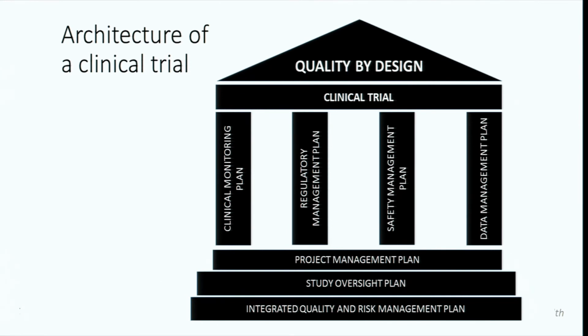You need to have a clinical monitoring plan, a regulatory management plan, a safety management plan. These are the sorts of things that are planned prior to patient one, and a data management plan. Now, if you're just the site, you're still doing those sorts of things, but from a site perspective. You want a project management plan.